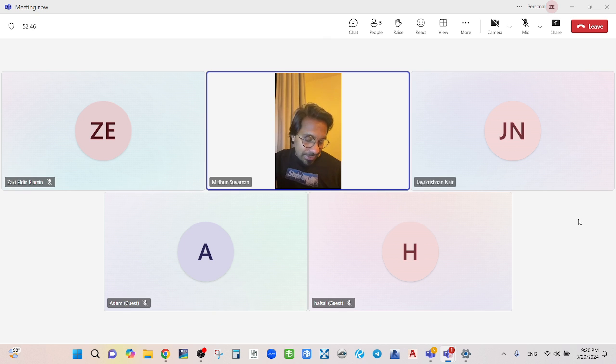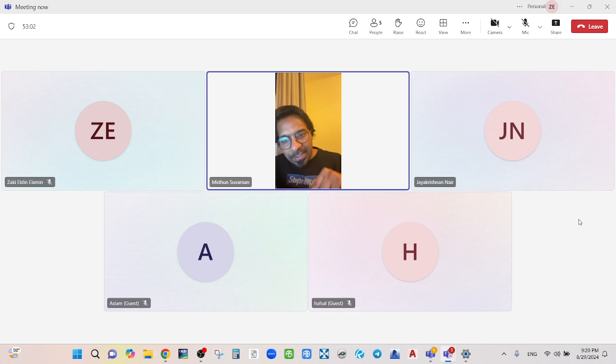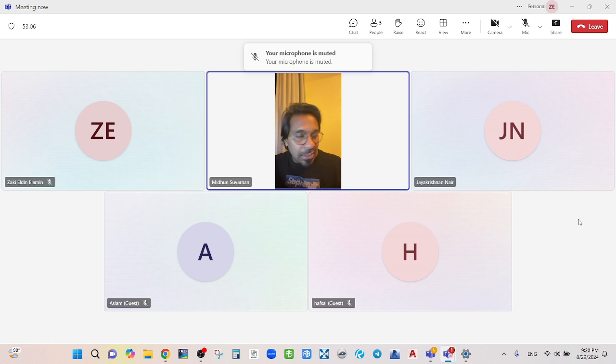So what I would say in the ITT is, dear bidder, I want you to submit the bid on this date. Once you submit the bid, and once I issue the LOA, you can't back off. If you back off, I will encash this bond. The bond should be valid till the performance bond. In any case, if you step out, or fail to sign the contract, or fail to submit the performance security, I will encash this bond.